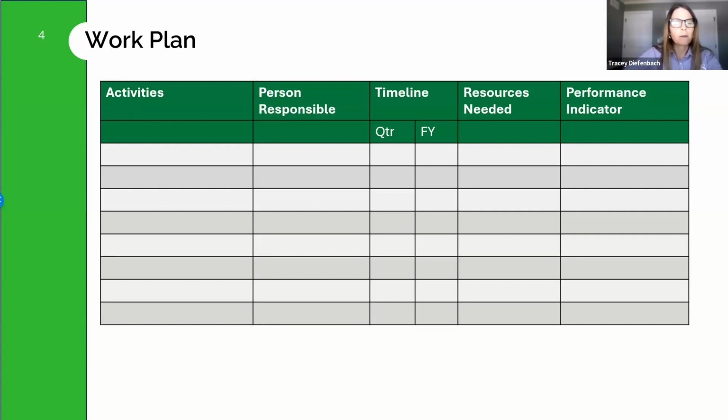Other examples of activities that might occur during this beginning period of the project will vary based on project, but might include things like finalizing your MOU, securing contracts for services or systems, completing any type of pre-work that might be required for implementation of a technology system, or policy and procedure development. This planning period should ultimately show that you are creating the foundation for a successful implementation and helping to identify and mitigate any risk and ensure that your program will be effectively implemented.